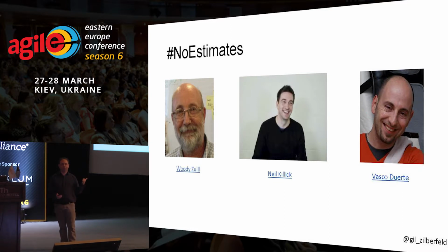I don't see it as no estimates, really, which some people do, but it's more estimates plus. What can we do in order to put our guess in the right light? So, for example, if I take Lisa's example of complexity estimation, if I tell you that we're going to do a project that is going to take 3 months, does it sound okay? It depends, of course. If I tell you that it will take 3 months and nobody's done it before, how does the 3 months sound now? Perfect, yeah, exactly. So compare these numbers with other stuff.